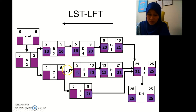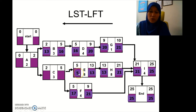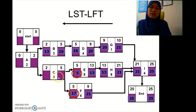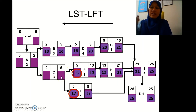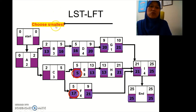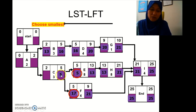For the second row: 21 minus 8 is 13, bring 13 here. 13 minus 8 is 5. We stop here first because there are two inputs going here. Let's finish the other branch: 21 minus 4 is 17. Now we have 5 and 17 to choose from. When going backward, we choose the smallest number, which is 5. So 5 minus 3 is 2.